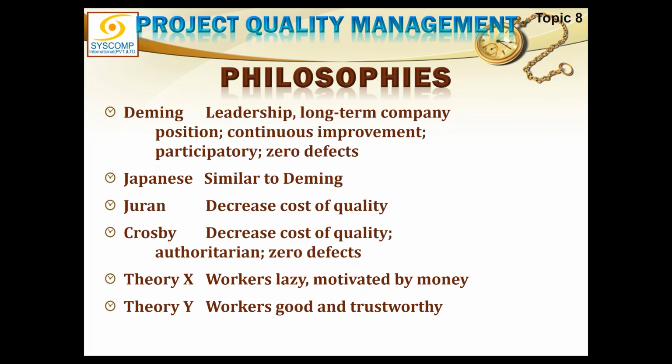which includes quality assurance as well as quality control. Both of these things are of equal importance. But if you have good quality assurance going on, then there definitely is no need for having a large staff for quality control, because now you will be producing less bad items and therefore fewer people can check it. So the money you have spent in quality assurance will actually give you dividends on the other end, but you cannot remove quality control altogether.